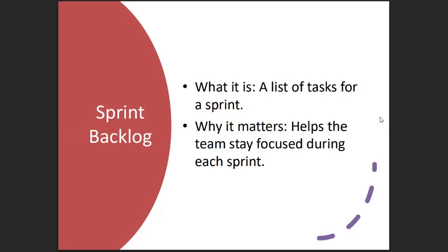So within those 2 weeks, every day as a project manager, or a Scrum Master, your task would be to organize the stakeholders for Scrum meetings. You have your daily stand-up meetings. At the end of the sprint, you have your sprint review meetings. At the end of the sprint review meeting, you have what we call the retrospective meeting, where you get to talk about what went well during the course of the sprint, what didn't go well, and everything. Then you move into the sprint planning meeting again, where you plan for the next sprint.